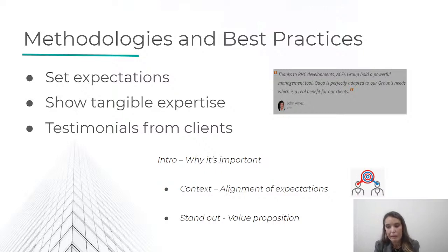And we ended up losing this bid because they didn't think that time frame was necessarily feasible for all of the customizations that they were asking for, after they received a couple different proposals from other ERP systems. We ultimately ended up losing that bid because the expectations might not have been correct. So if it's going to take 6 months, then it's way better to put 6 months in there and get it done in 4.5 than to do the inverse of that.